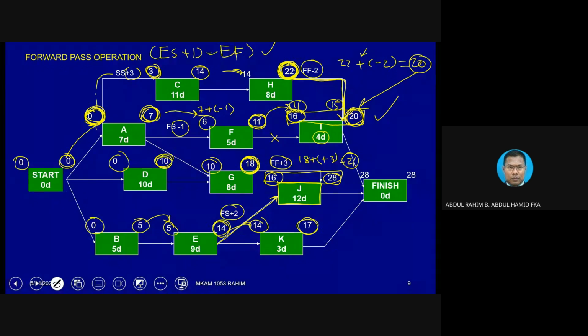If it is 21, then we minus 12. Anyway, we don't have to minus in order to get the value. We know already that between 21 and 28, the bigger value is 28. So 28 and 16 will be the values that we log. And now the dominant relationship is coming from E, not from G, unlike between I and H.